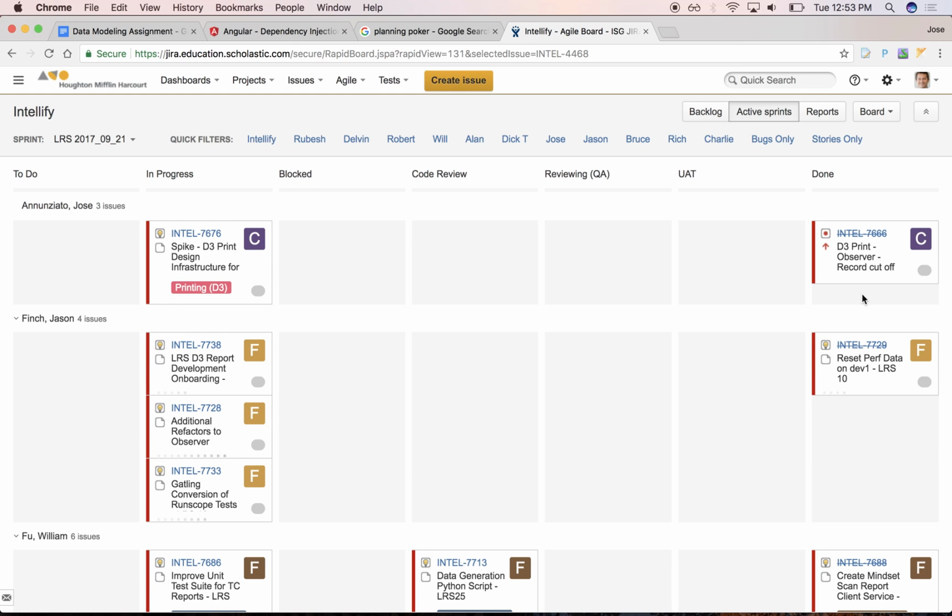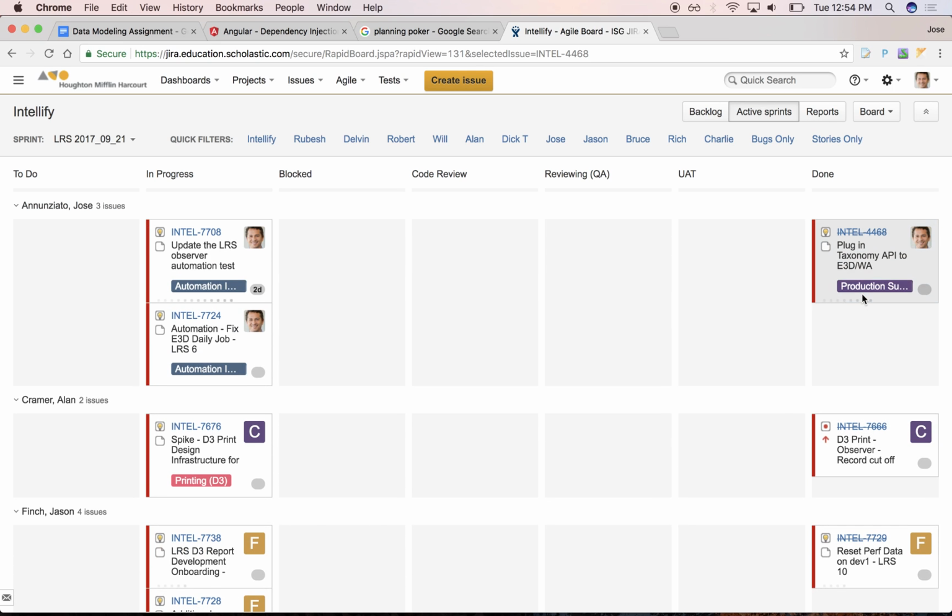So if there's some risk that we identify throughout the sprint, we keep the entire team up to date, right? That I thought I was going to be able to finish, but I'm not. So that if some other person in the team has completed theirs, perhaps we can move those tasks over to someone else. Okay. And again, we're looking to improve the overall efficiency of the team, not the individual. Obviously also the individual, but we want to measure whether we complete everything by the end of the sprint.